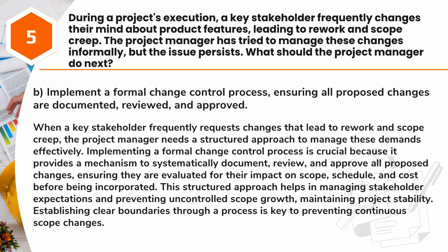Implementing a formal change control process is crucial because it provides a mechanism to systematically document, review, and approve all proposed changes, ensuring they are evaluated for their impact on scope, schedule, and cost before being incorporated. This structured approach helps in managing stakeholder expectations and preventing uncontrolled scope growth, maintaining project stability. Establishing clear boundaries through a process is key to preventing continuous scope changes.